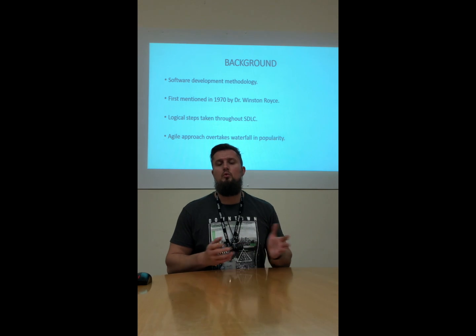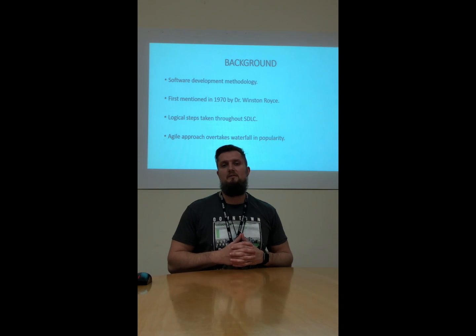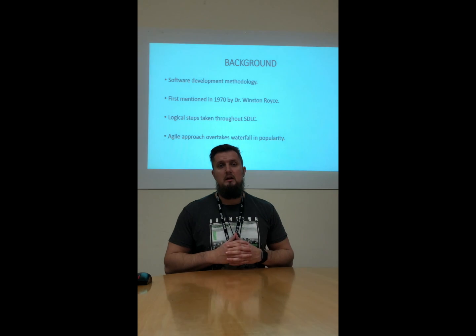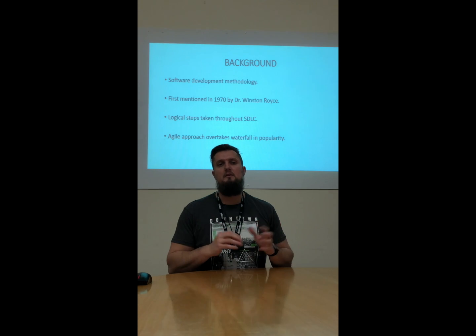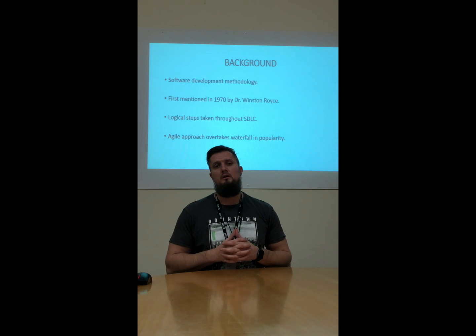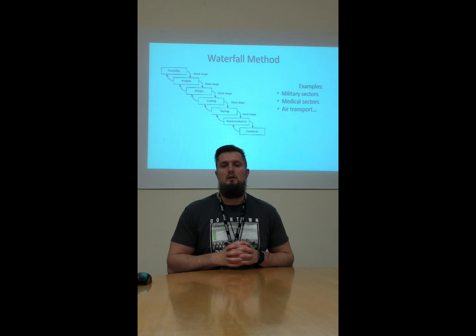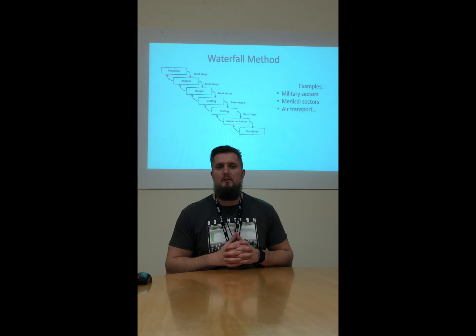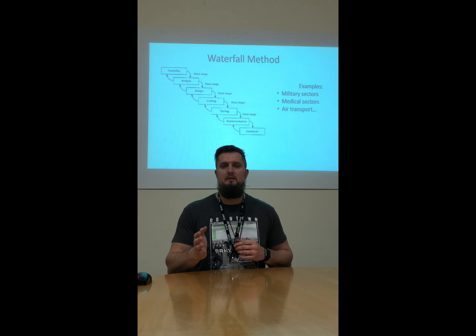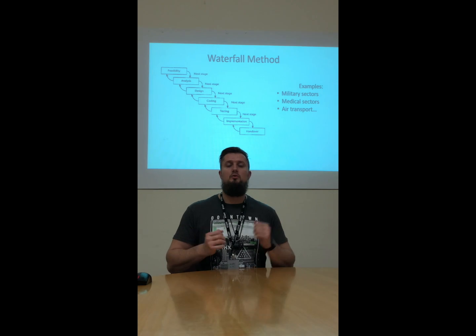Just a quick background. Waterfall is a software development methodology, first mentioned in the 1970s by Dr. Winston Royce. It follows the logical steps taken throughout its system development life cycle. However, these days, the Agile approach overtakes Waterfall in popularity. To build a project using the Waterfall method, it takes 7 steps: feasibility, analysis, design, code, testing, implementation, and handover.